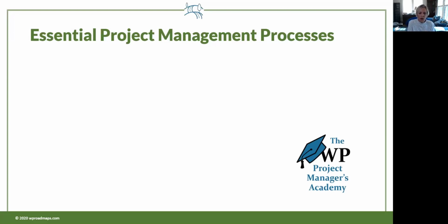Okay, change control. A clear process that is invoked without exception is the only path to stopping scope creep. A good change control process always includes a change budget and a method for using it. This is one of those essential processes you need.